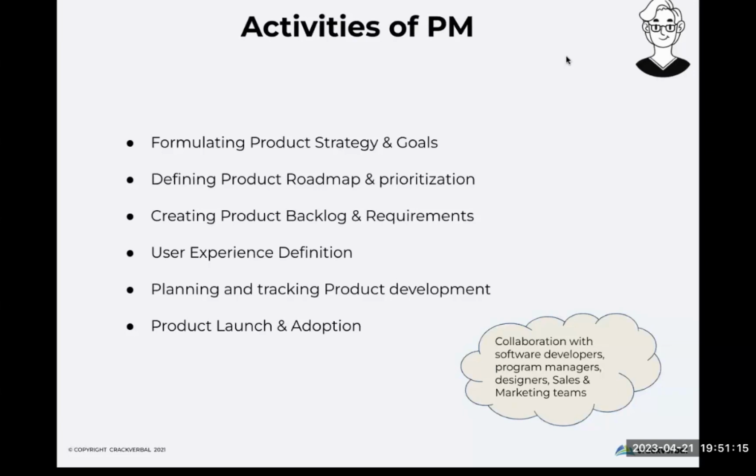and accordingly they would hire multiple product teams, right? But largely, something that's industry wide accepted, I'm talking about middle management product management, is if you're a product manager, you typically will be working with development teams of about 15 to 20 developers. And that's typically the scope, right? So if a product has to be built and it needs 100 developers, it needs to be broken down into mini products, and it probably needs 6, 7 product managers. That's how it works.